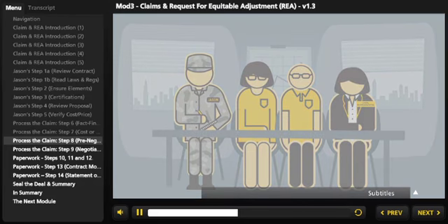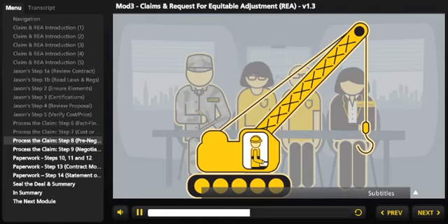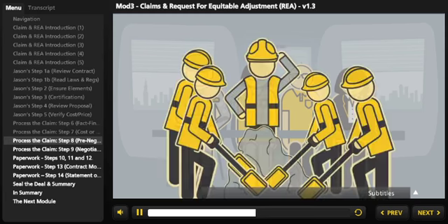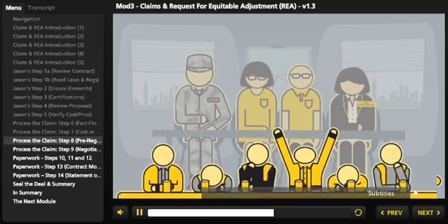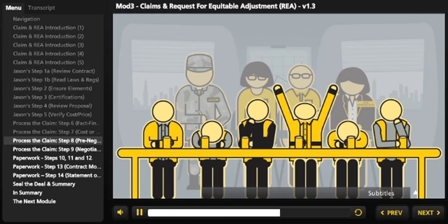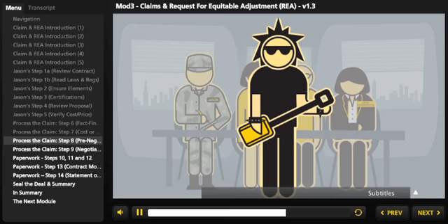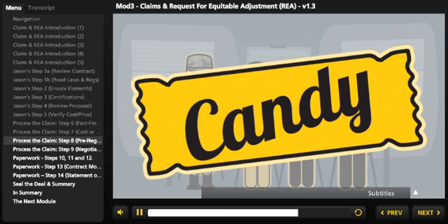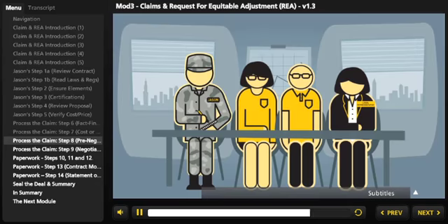With the help of the technical team, Jason decides to approve the large crane with an operator, $6,000, the 5 workers which maneuvered and helped remove the rock, $3,600, and disapproves the stopped work employees, his cousin Ramon's expenses, and finally, since Charlie lost his receipt for the candy bar, Jason dismisses the cost. Jason establishes the government's negotiation objective is $9,600 and goes in to negotiate with Charlie.